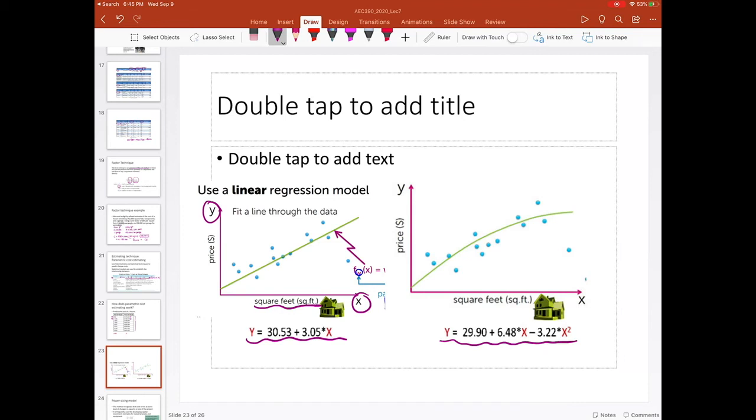But I want you to understand the way the price is determined. So first you get historical data and you plot it on the chart, and then you find a line to describe these dots, and then you stick with one formula. The next step is, okay, the size of the house is 4,000, right? And you want to know the price, so you replace the x with 4,000.